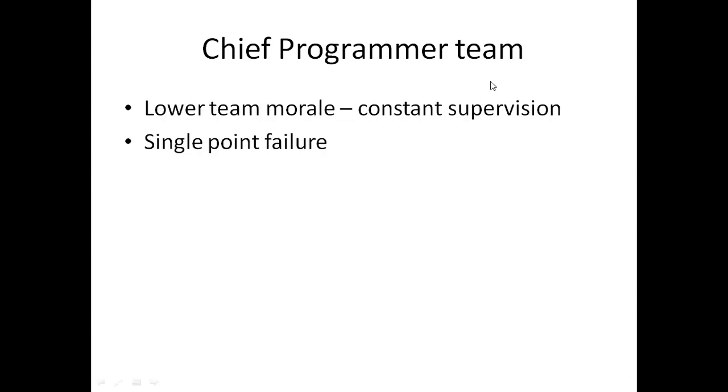The problem with this chief programmer team is there will be lower team morale, because the chief programmer will be constantly supervising the team members. So team morale will be low. Also it inhibits the original thinking of the programmers, because the team members will be constantly monitored by the chief programmer, and the individual programmers might not have any voice.